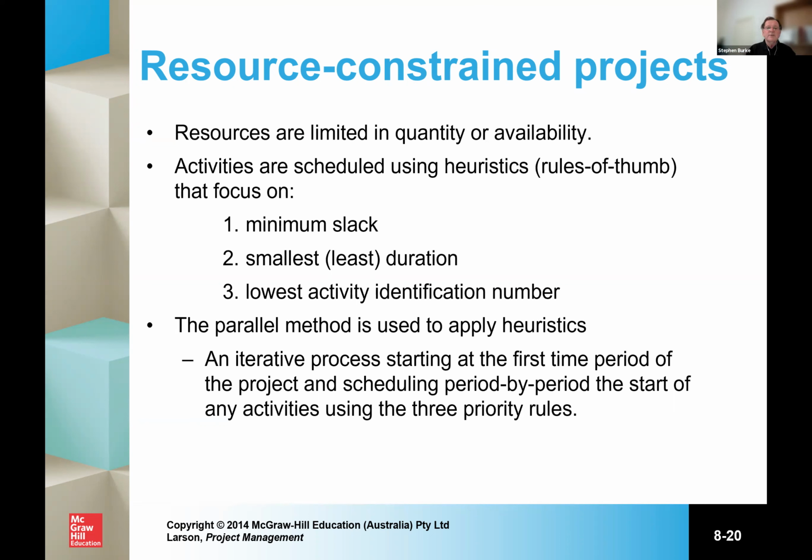And these heuristics focus on minimum slack, smallest or least duration for the activities, and the lowest identification number. So this is how you schedule activities using heuristics. And as you can see, it's a way of also moving the risk of the projects around as well.